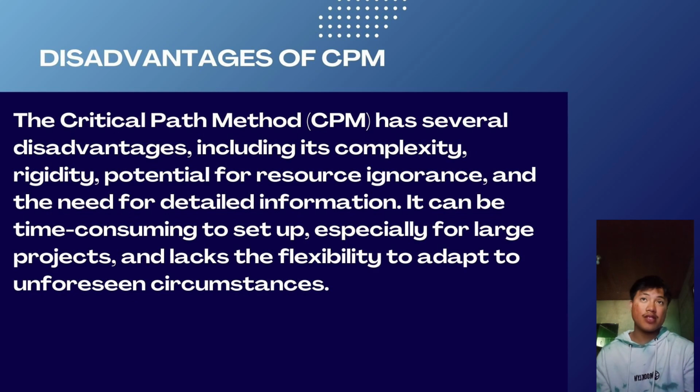And the disadvantages of CPM: the critical path method has several disadvantages, including its complexity, rigidity, potential for resource ignorance, and the need for detailed information. It can be time consuming to set up, especially for large projects, and lacks the flexibility to adapt to unforeseen circumstances.